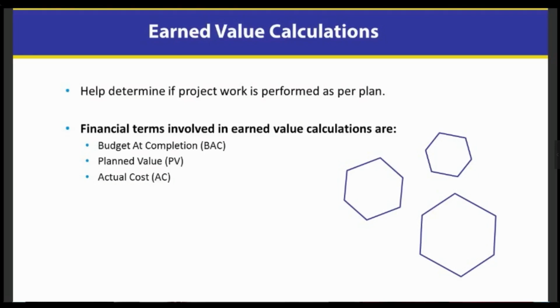So fast tracking basically says we plan to do it like this, where I have an activity, finish, start, next activity, finish, start, but now I'm going to change that and we're going to do this at the same time. So maybe the original plan was that the same resource, the same person would be doing both those tasks, couldn't do them both at the same time. Now we need to speed things up so we can bring in an additional resource to do the second task at the same time as the first task. That's right. And if it's external, that might cost us money. If it's internal, I would look at maybe an activity that has float, where it can go a little late, and pull that person from there if they have the same skill set.